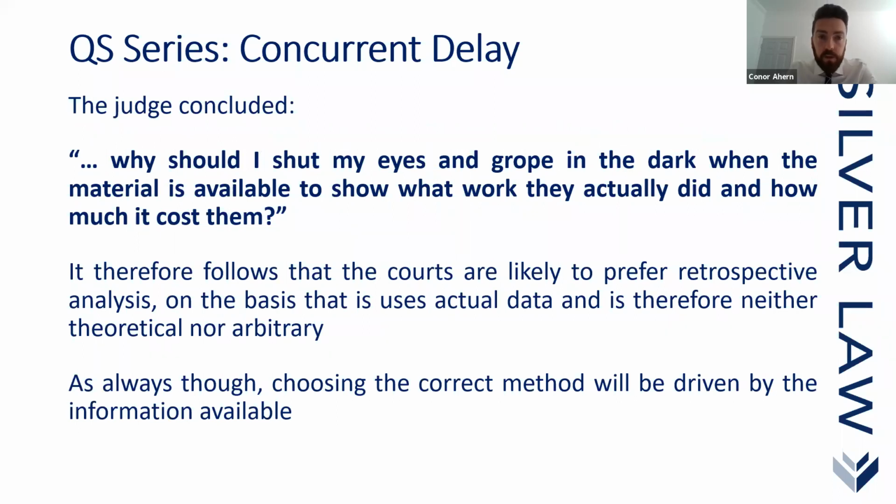So the judge in this case concluded, and an interesting statement is that he basically said, why should I shut my eyes and grope in the dark when the material is available to show what work they actually did and how much it cost them? It therefore follows that the courts are likely to prefer a retrospective analysis on the basis that it uses actual data and is therefore neither theoretical nor arbitrary.